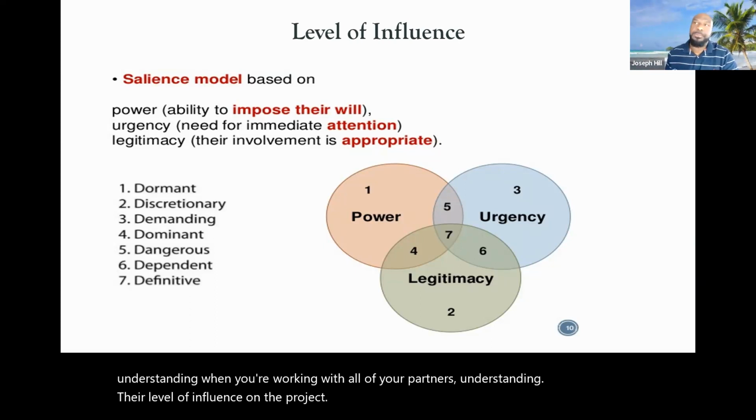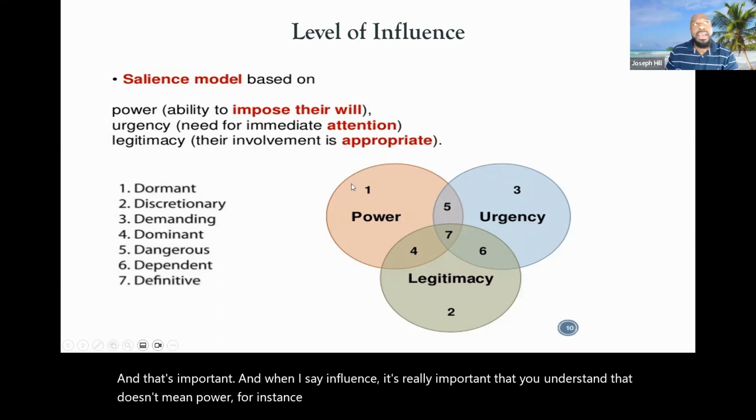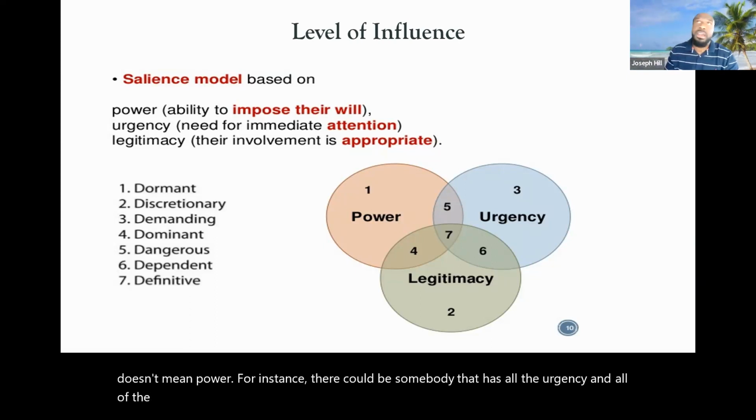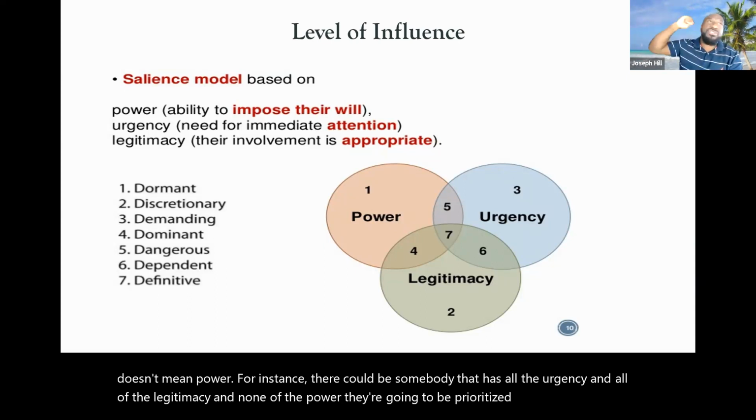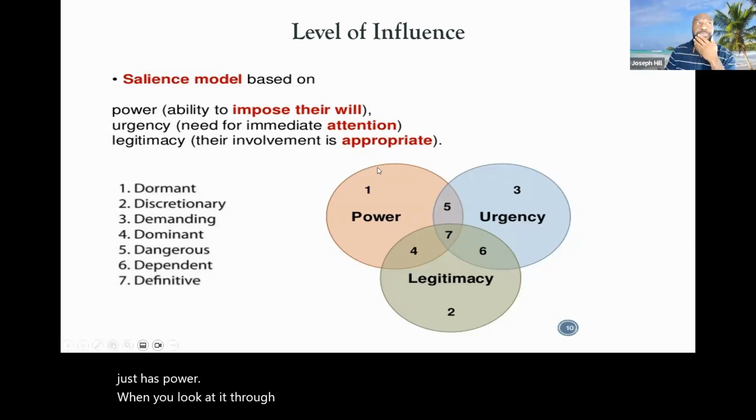And that's important. And when I say influence, it's really important that you understand that that doesn't mean power. For instance, there could be somebody that has all the urgency and all of the legitimacy and none of the power, they're going to be prioritized over somebody that just has power when you look at it through the salience model.